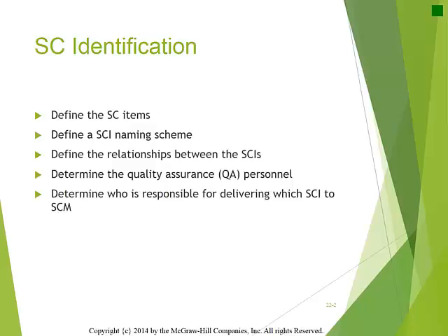The CI creation date, target completion date, and final completion dates are useful for tracking the status of a CI. And a version control number is used to keep track of multiple versions of a configuration item. An update history is a list of updates to the item. The description is a brief description of the CI.